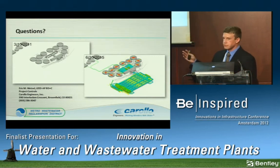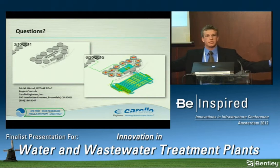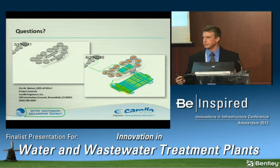when we started the 4D visualization, there was certainly a learning curve in what we were going to try and achieve. So we had to modify our 3D model to build out the 4D. We're adding CJs and breaking pipe. When you're modeling a pipe, it might be 600 yards long. Well, the contractor would laugh at you if you said you're going to crane in a 600-yard pipe. The answer is no, it's going to be joined out. So when we got into the 4D, yes, the 3D model ended up being slightly different because we needed to incorporate how the contractor was going to build it. And it wasn't necessarily a full effort when we were in design, so we had to modify beyond that.